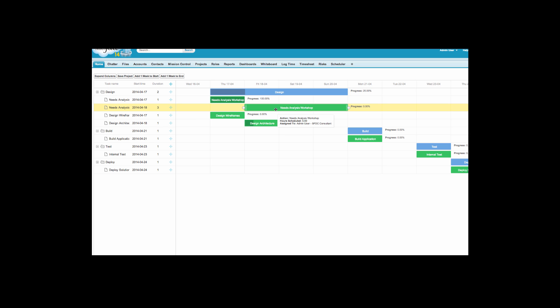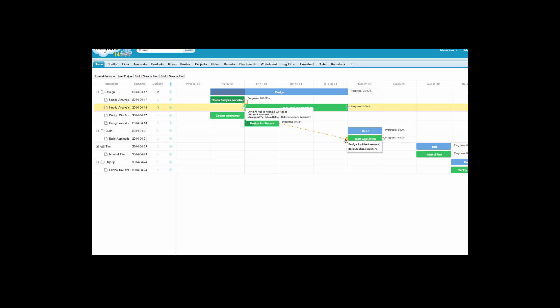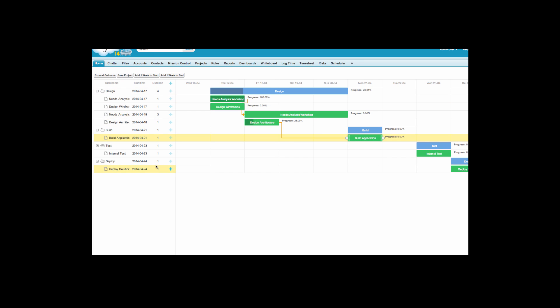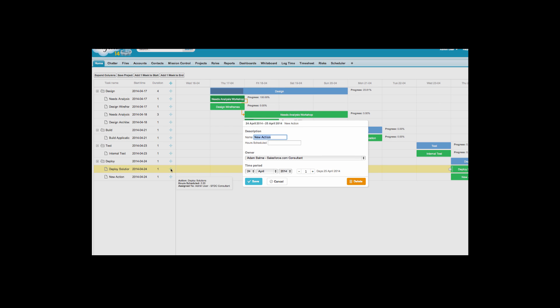You can quickly create dependencies between actions, again using the drag and drop capabilities. Once changes are complete, simply save the project. Using the Gantt chart, you can create new milestones and actions by clicking on the plus symbol on the left hand side.